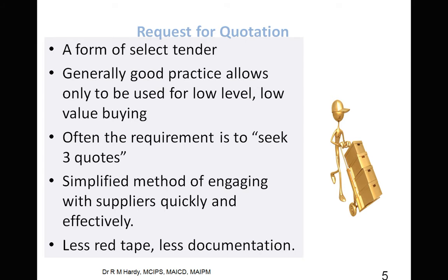So a request for quotation is essentially exactly the same as a tender, except there is no formal cutoff date. So if a builder needs a bit more time to wait to hear back from their subcontractors or what have you, that's fine.